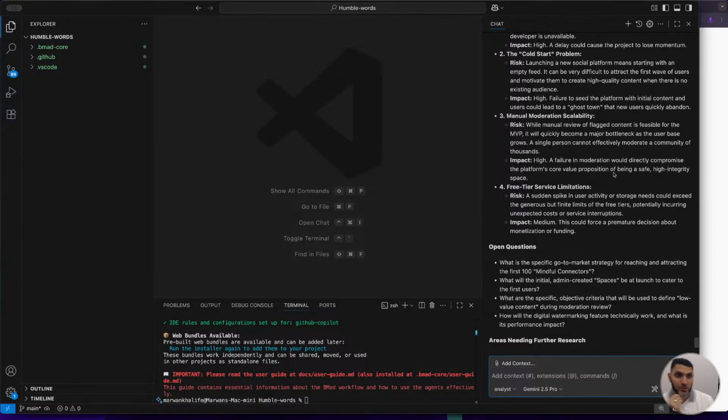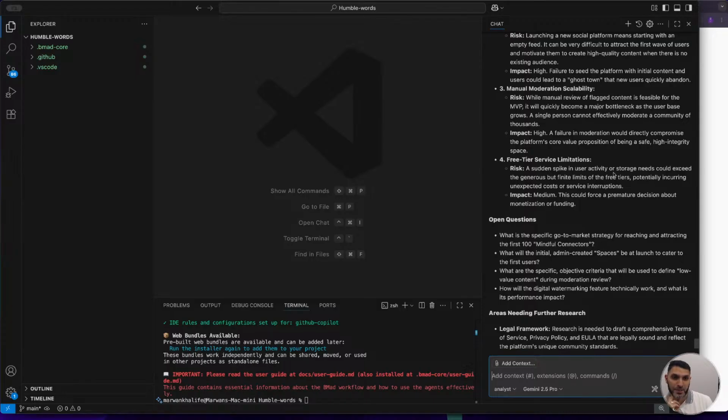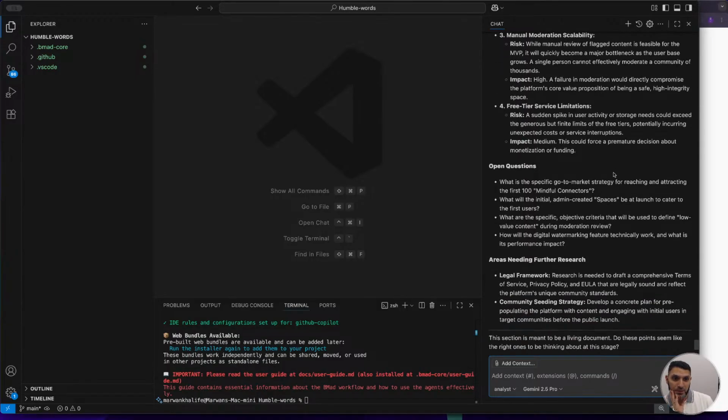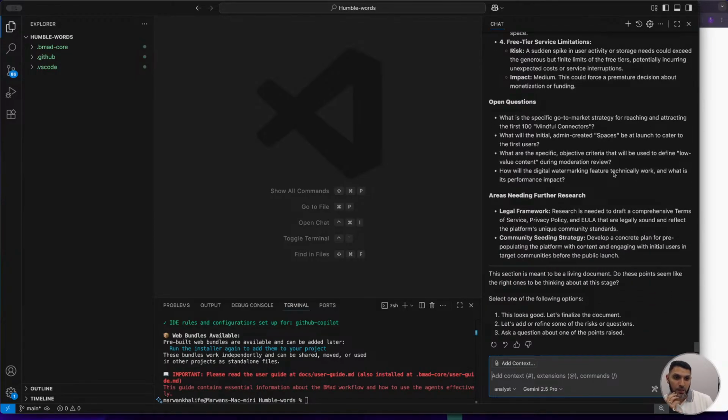Cold start problem risk. Launching a new social platform means starting with an empty feed and can be very difficult to attract the first wave of users and motivate them to create high quality content when there is no existing audience. Of course. Sure, okay, great, very good. What is the specific go-to-market strategy for reaching and attracting the first 100 mindful connectors? What will the initial admin created spaces be at launch to cater for the first users? What are the specific objective criteria that will